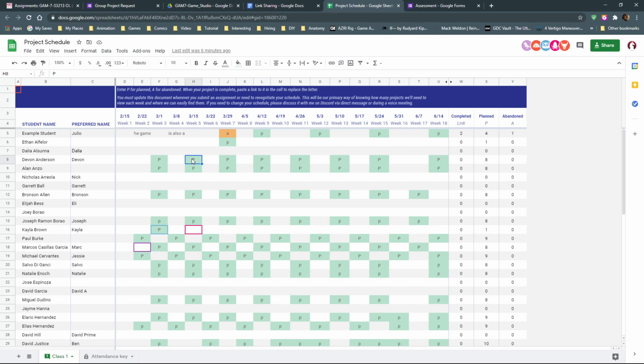Sort of. If your first goal is, I want to have the basic mechanic scripting in place, and then you turn it in at that stage, that's like a pre-alpha or an alpha development stage, that's fine. And then my next goal is, I want to have the test level design layout and mechanics working together, that's fine. And then you turn that in, we show that. And then the third time you say, now I want to have my art assets complete and integrated, then you turn that in, and that's fine. At that point, maybe the project is done. That's fine with me. Yeah, you'd be turning in your milestones at that point.